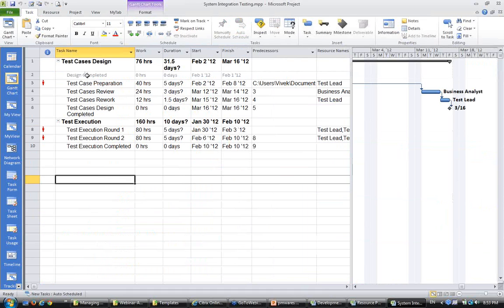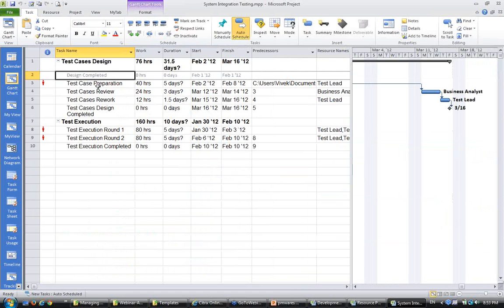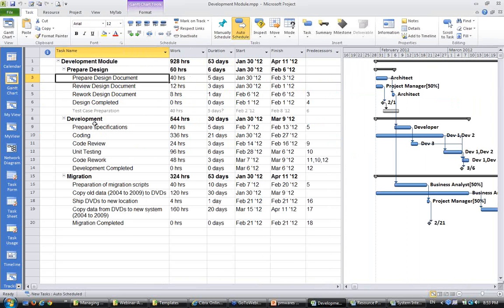without saving it. You see, even if the new project I have closed without saving, the dependency has come over here and also come over here. So the dependency is assigned by creating a new project, adding both of these projects, assigning the dependency, but there is no need to save the project.